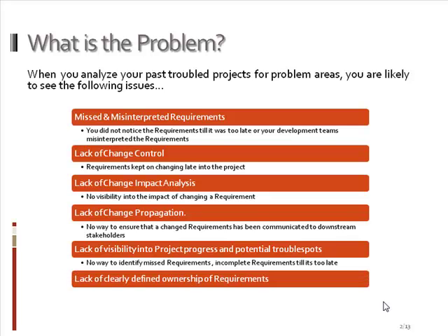Another problem is lack of clearly defined ownership of requirements. Why is this important? Well, you'll notice that requirements often fall through the cracks of ownership. That is, you're about to deliver a project or you're about to hit a milestone and you realize that you thought somebody else owned that requirement and that never got delivered because the other person thought you probably owned it.